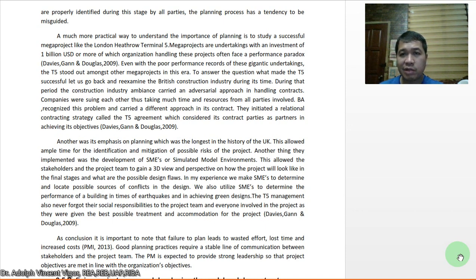So to answer the question, what made the T5 successful, let's go back to re-examine the British construction industry during its time. So during that period, the construction industry ambience carried an adversarial approach in handling contracts. Companies were suing each other, thus taking much time and resources from all parties involved. BA recognized this problem and carried a different approach in its contract. They initiated a relational contracting strategy called the T5 Agreement, which considered its contract parties as partners in achieving its objectives.